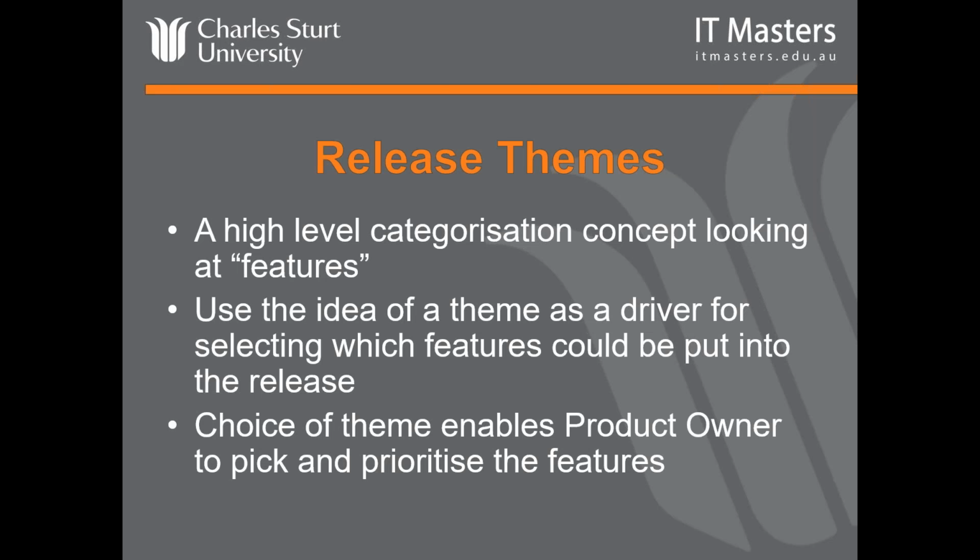And I just said in the question, for example, customer or reports or something like that. We're going to work on reports for this release. And of course, as you do further analysis, it derives more details to create the stories, and dependencies might be identified, as well as some of the stories proving to be more complex than we originally considered, and those issues will then often result in some of the stories being placed back onto the product backlog and being removed from the release.